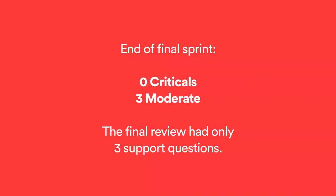So one thing that I will say is since we went more into that Kanban continuous flow in the sixth sprint, where they were seeing it every couple of days, it really drove the point home that it's okay to do that when we did the final sprint review, and it was like, yeah, we already saw this stuff, and we already fixed the bugs. So there were only three kind of moderate issues at the end of that sprint, because we really had this collaborative polishing across the whole last sprint, so it really turned out really good.